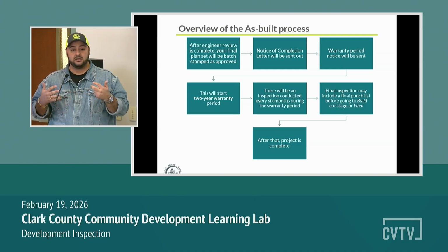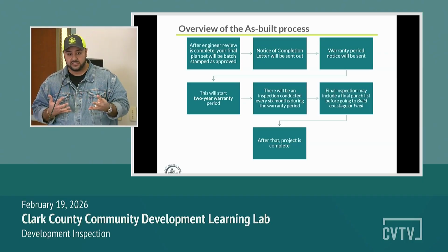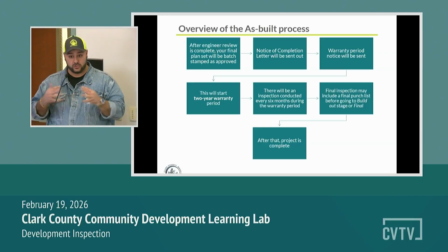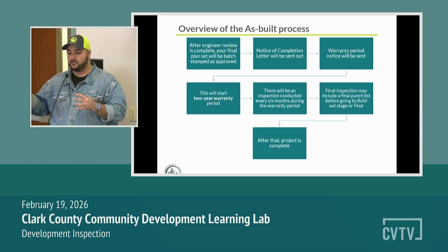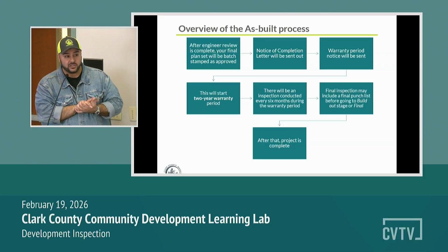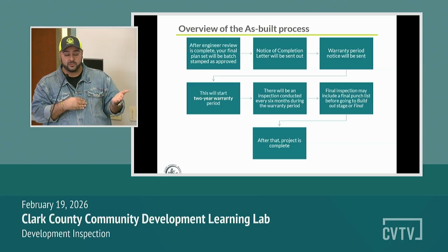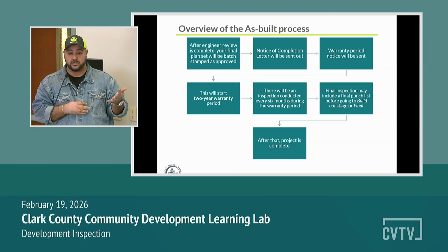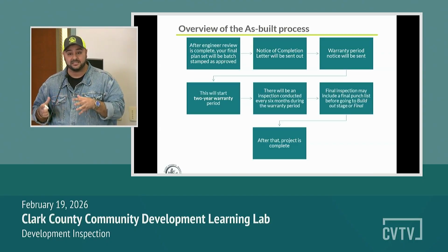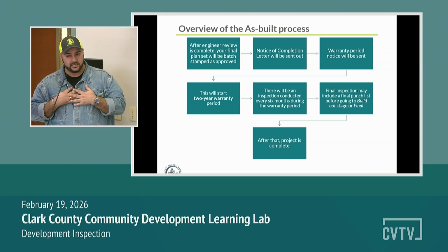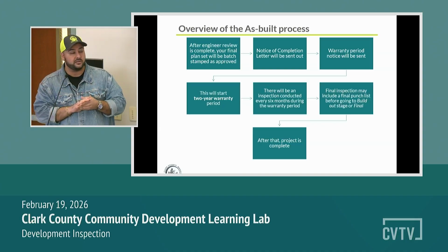Once that is completely done, all the repairs are fully signed off, I will get that approval letter, and once we pass that time, assuming we have everything done, we have their blessings, all parties involved are good to go, then I will actually release the bond at that time. And again, that bond, the formal document that you submitted, will go back to the surety company. You will receive a formal release letter from us saying you are good to go, you've met all the requirements, you are fully accepted at that point. The county's taken responsibility, and we will handle the project thereon.